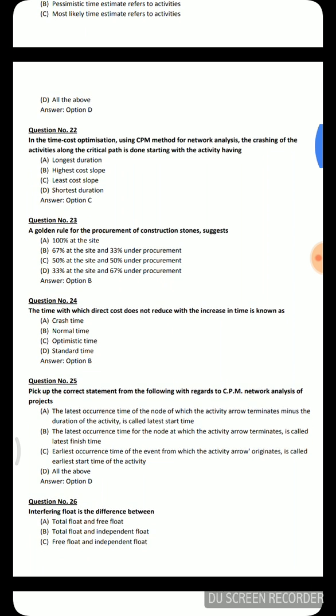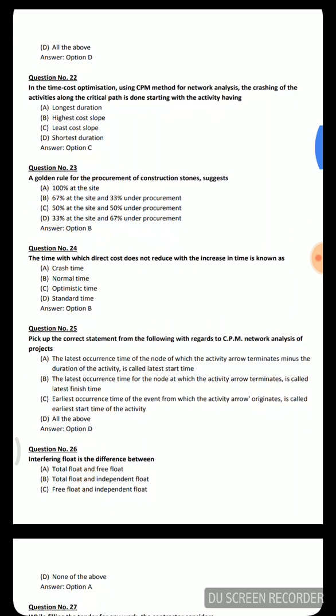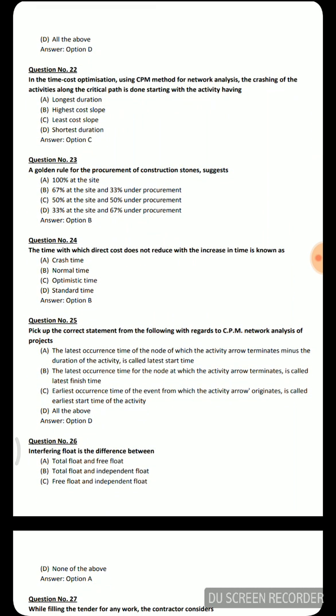Question 23: A golden rule for procurement of construction stones suggests — 100% at site, 67% at site and 33% under procurement, 33% at site and 67% under procurement. The correct answer is 67% at the site and 33% under procurement.